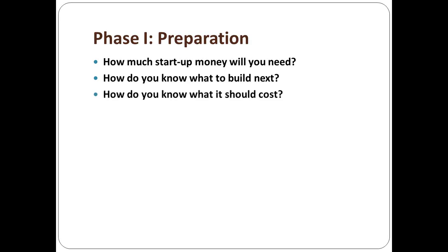How do you know what it'll cost? Well, you better have someone who does estimating all the time. I suggest, and for the last 30 years, we've gotten a builder or builders involved on the front end to look at the concept and the initial drawings to be able to give you a ballpark range of what it will cost in your area.